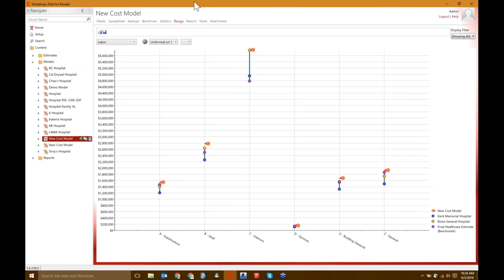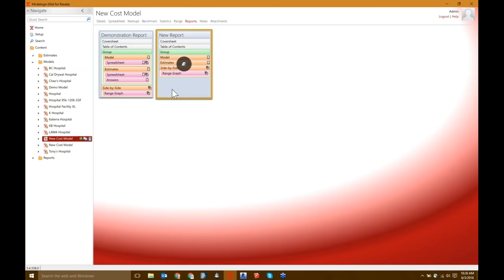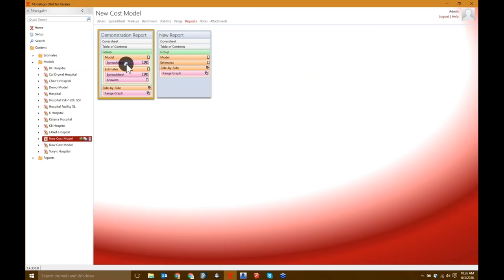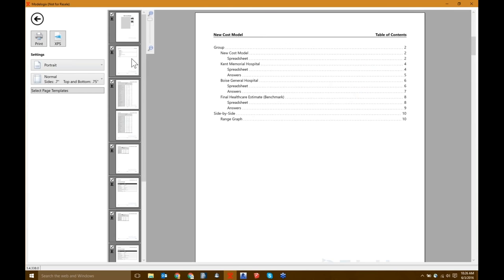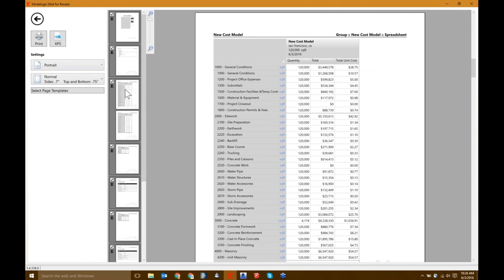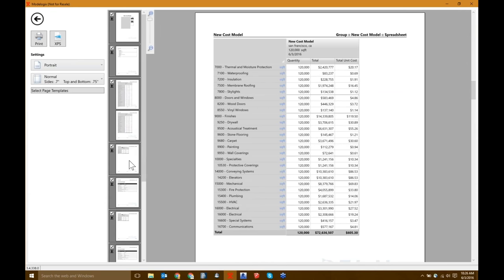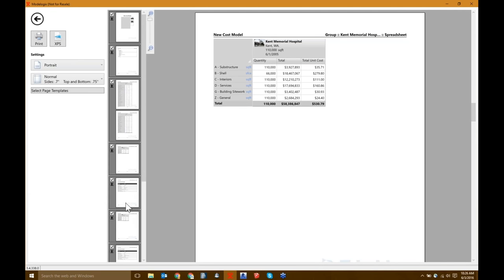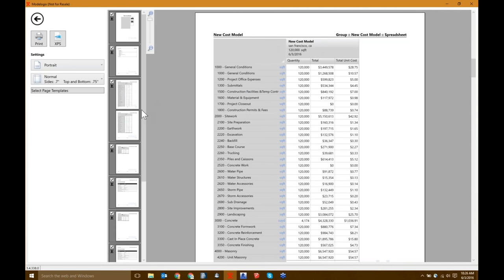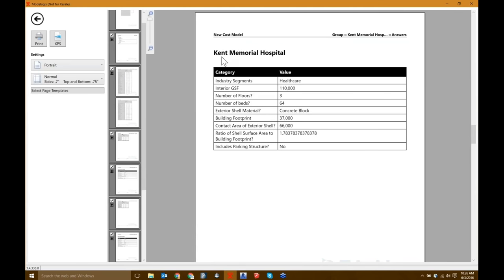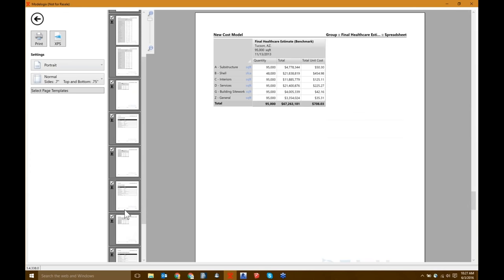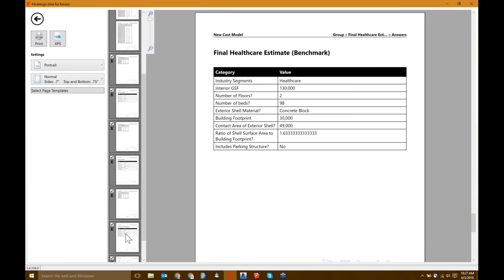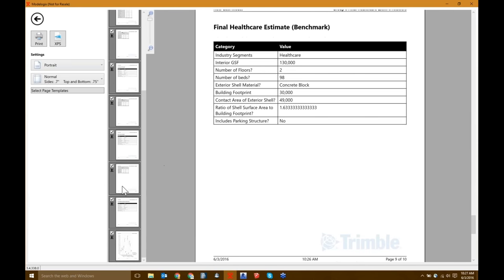And just as we saw in the spreadsheet, we can actually slice it and dice it. We can isolate labor and understand that a lot of our labor money is coming from interiors. That's what's driving the cost. We can also see our subcontractor. So our services typically, a lot of the money is going to our MEP there and our shell. So once we've analyzed the data, we're comfortable with the cost model, we want to move forward and we want to actually publish this to our constituents, whether it is our client, our executives, our estimating team. We can move into reports. So I've set up a demo report here. And this is the final product that you'd receive. So this is where you'd have your picture of your project, maybe a rendering. Our second page is our table of contents, so you can navigate through the report. We have our spreadsheet view that we looked at previously. We can create different views depending on how we slice the data. In this particular case I included only two. We can look at some key metrics - GSF, number of floors, number of beds, exterior material, building footprint, ratio of shell surface area to building footprint.